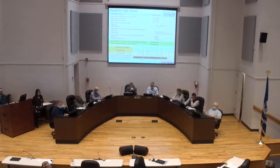That project is scheduled for 22 months with the contracted completion by April of 2022. The green bar is showing the current scheduled completion in February of 2022. So that's going along pretty good, and has been about 6 weeks ahead of schedule, and has been in that route for about 3 or 4 months right now. So it's moving along. Any questions on that slide?